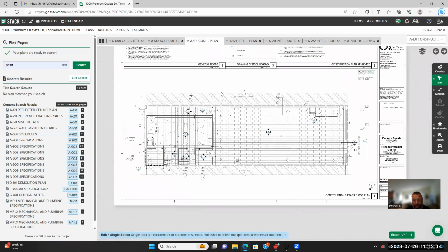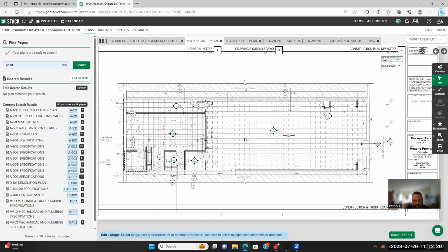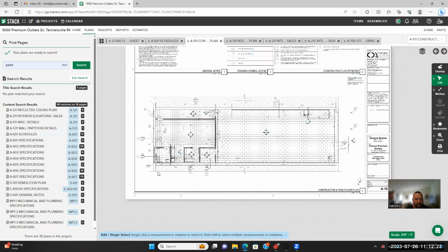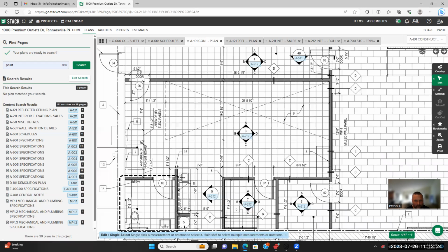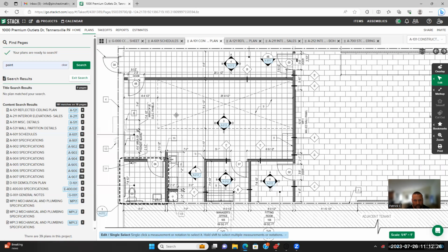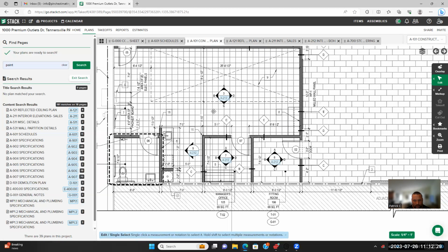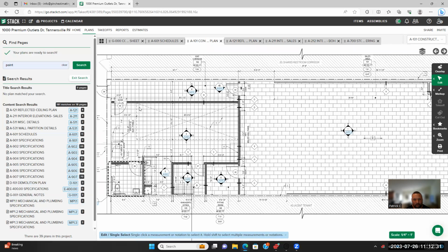And on the exterior elevations, we know it was only the storefront, right? The back wasn't even on the exterior elevation. So we know that's not getting painted. But on a bigger project, they might have the call outs in here like PT01, PT02, and you would do surface area and just do the takeoff like this.